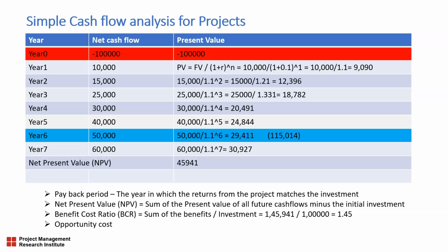Each of these can solve this issue. They are supposed to do a cash flow analysis for all three options, and see which one has the maximum NPV, shortest payback period, and the maximum benefit cost ratio. Based on that, they will decide.